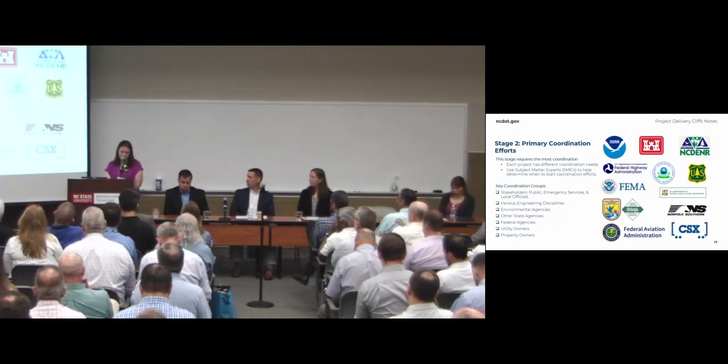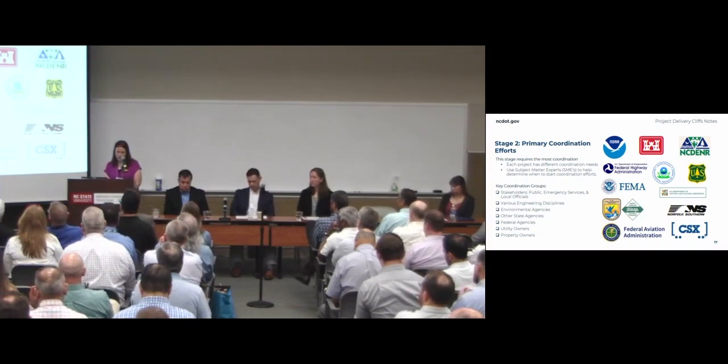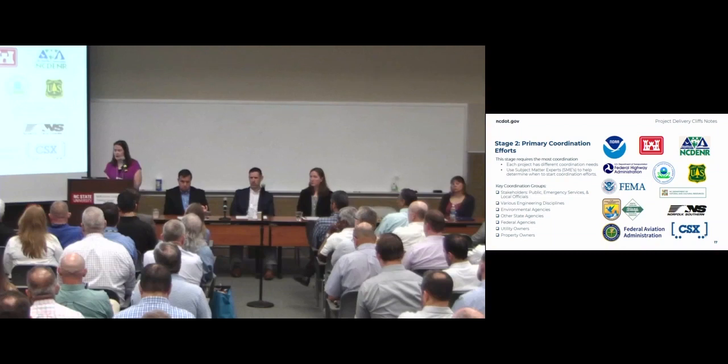It's also worth noting that coordination can drive the need for deliverables. For example, hardships. You're reaching out to the public and all these different organizations. They'll bring to light things that you were not aware of. This is excellent knowledge that's going to help you produce the best plans and the best project. And again, in this stage, right-of-way advanced acquisitions should be occurring if needed.